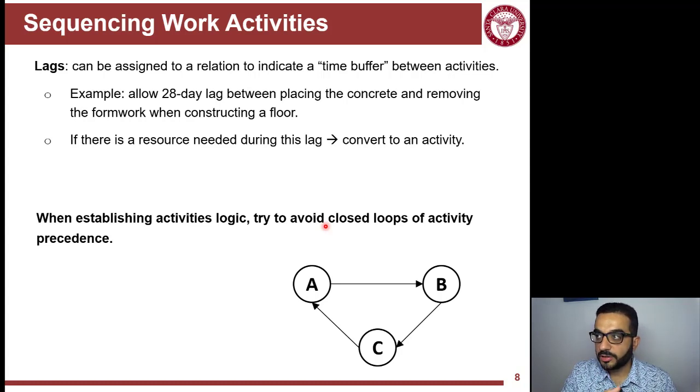So for example here, the famous example is concrete. When you pour the concrete, depending on what type of element you're doing, is it a slab on grade, is it a foundation, is it a column, or floors, slabs and beams? Of course, the more horizontal, more flexural the member is, the more lag and curing time needed. So the longest cure time is for slabs and beams compared to columns and then foundation. So you have to account for that.